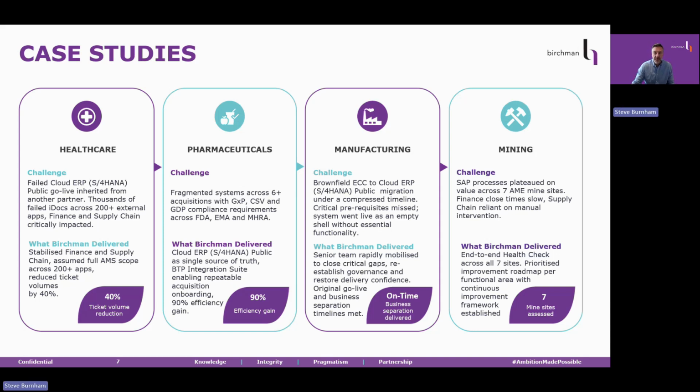Critical prerequisites were missed. The system went live as what can only be described as an empty shell. Essential functionality was not there. The business had a new system that could not do what the old one had done. The instinct in this situation, and we've seen it many times, is to assume that if the plan has failed, the deadline has to move. These are actually 2 different problems, and in this case, we kept them separate.